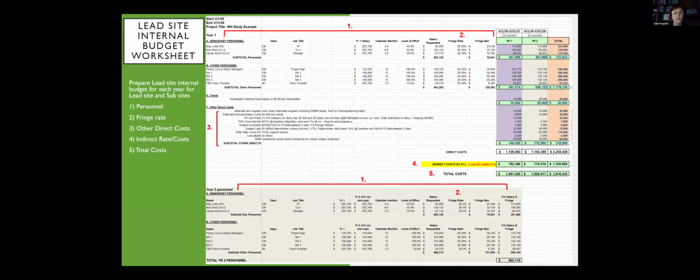And then anything else that you need here, like in this case, we just put how much per article. I think we put in $16,000 a year, so $32,000 total. We wanted some urine test kits, so those are in there. Incentives, specific labs that we needed that were not clinical, that we would have to come up with on our own, any consultants that we have, and any IRB costs that you need, whether it's in your institution or a central IRB, which costs, by the way, quite a bit, close to 10 grand a site. So that all has to be put in there.